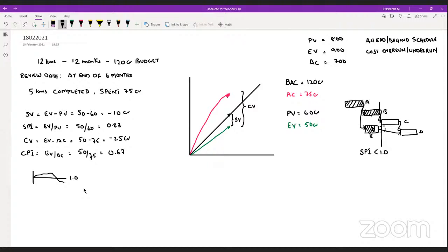It depends. Practically, maybe the material procurement would have already been done for that part of the 7 kilometers left, because of which the cost incurred was more. Or maybe part of the work has been done, but it is not completed entirely, it is under progress. So under progress work cannot be reported as completed. So we do not know.